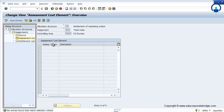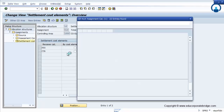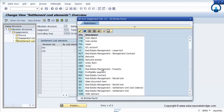You can assign either a cost element range or a cost element group. Then you assess the cost element for which you need to do the settlement, and finally the cost element category where you need to do the settlement — whether it is a profit center, cost center, fixed asset, or order. These are the different cost objects where you can settle the cost.